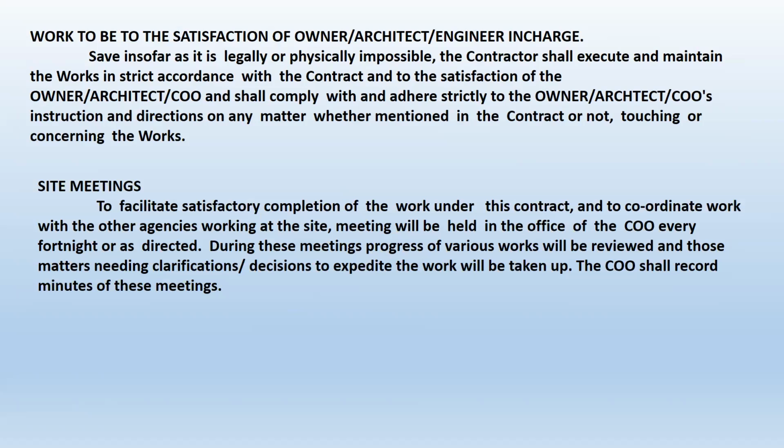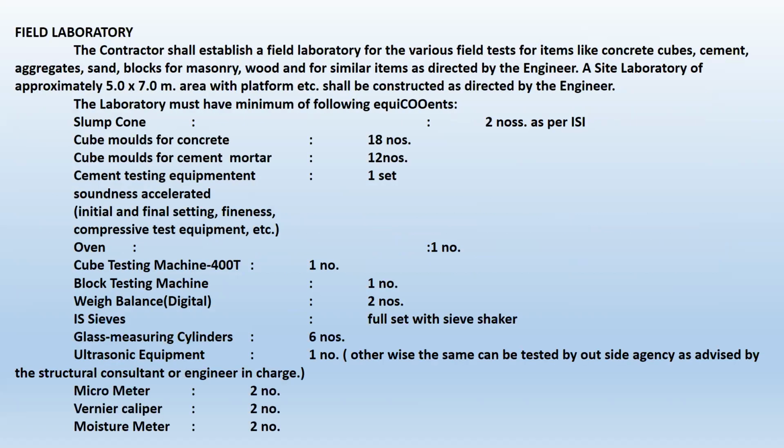Generally, in every project, site meetings will be conducted. So you have to make it compulsory that the contractor attends the meeting every week and reviews the progress, and he is also eligible to ask for any clarifications, and the client too can ask regarding the progress, etc. So attendance at the site meeting has to be compulsory for the contractor. It has to be made part of the work order.